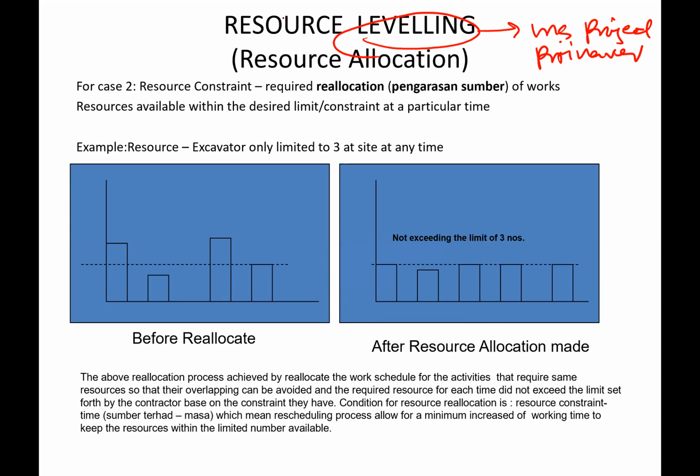Okay, resource leveling is a concept that we in the construction industry have used for a long time. Maybe they didn't know they have been using the concept. What is this concept? This concept simply says, let's say when you plot a graph based on resource, you will have the number of resources might be a lot at one time, and then reduce, and then a lot again, and then reduce. So you do not want to have this situation, because sometimes you need to bring in equipment, especially equipment, at a different quantity this week, and then next week will be a different quantity, the following week will be a different quantity.